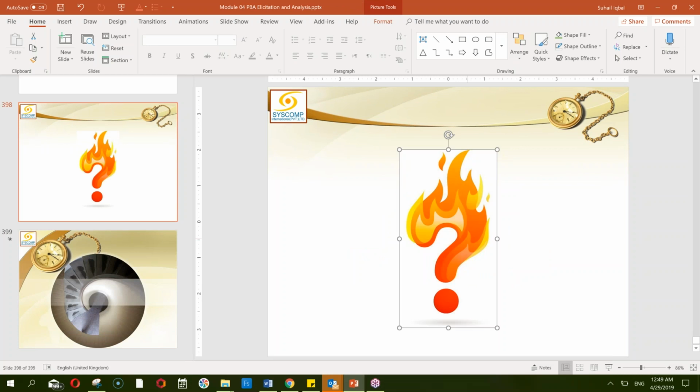For every requirement, the business team and the project team used to sit down and we have the cards. We show the card for every requirement. Every card has a different number. If the number is higher, then we have to justify why we selected exactly this number, why we are giving this number to this requirement.